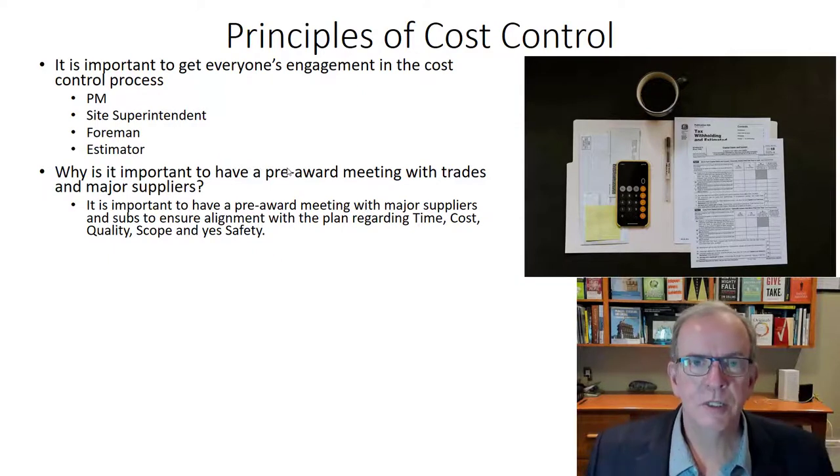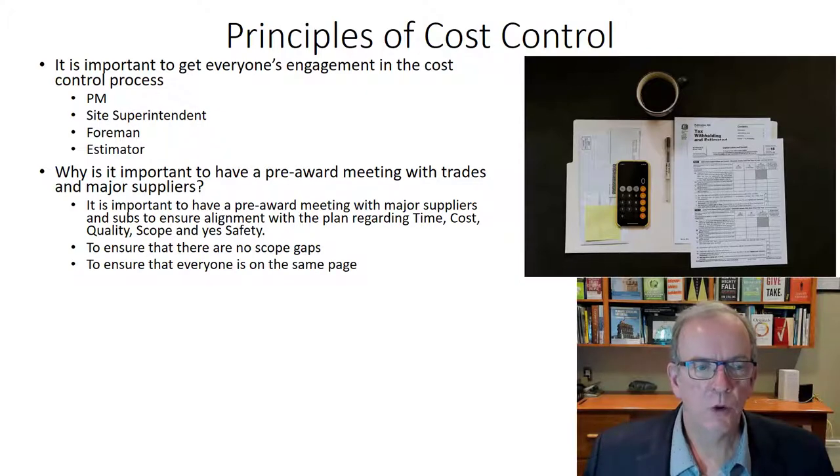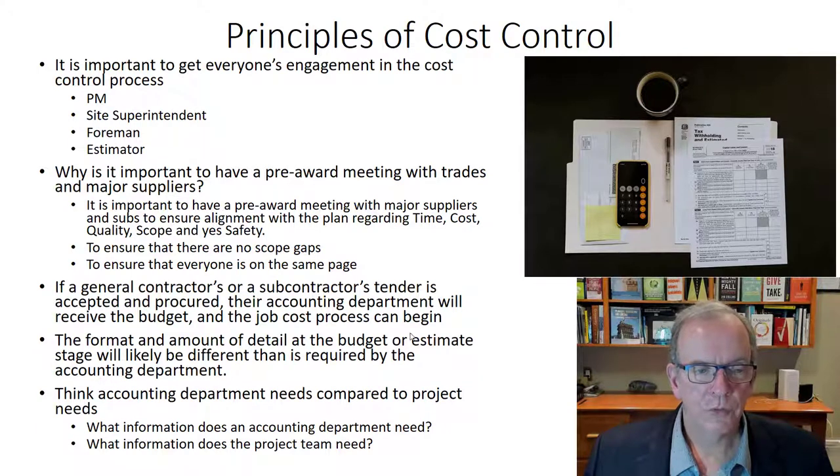So as soon as I am contracting with a subcontractor, before I've actually signed off on the contract, that is our best opportunity. If there's some issues or things that aren't really clear, or they think that they don't have to do something when we expect that they do, that's a very fundamental opportunity. And also we can engage them in basically inputs and ideas that will help us as the project evolves, right? So for all of those reasons.